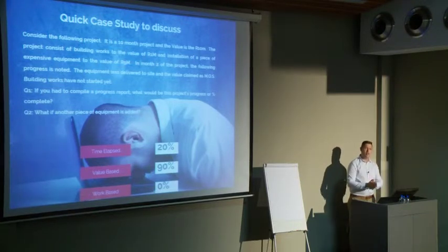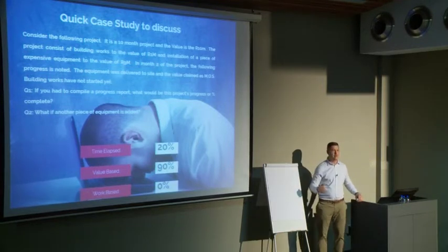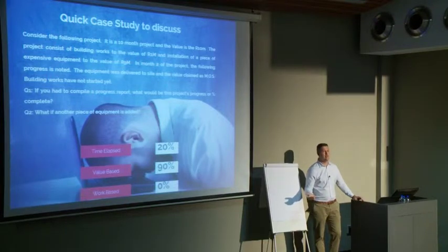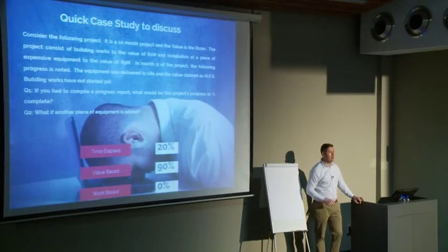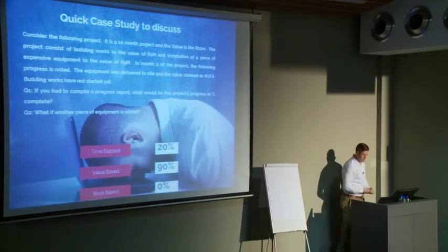Planned with actual inside each of these metrics, yes, then it's telling us something, you agree? Then we can say, okay, but what's the variance now? Because we planned to do 90%, we have done 90%. That means what's the variance? 0, we are on par. We planned to do 0 in month 2. The actual is 0. What's the variance? 0. We are actually on schedule.